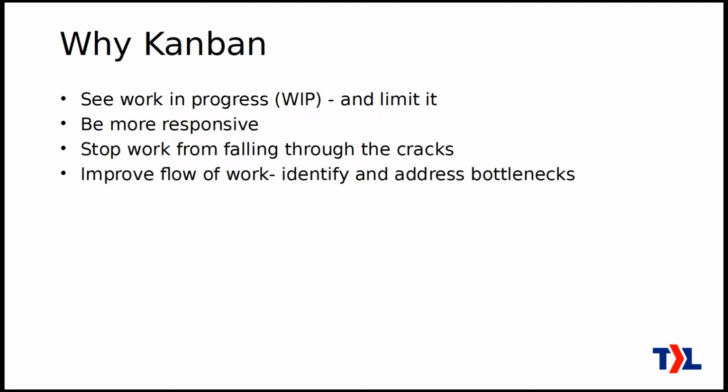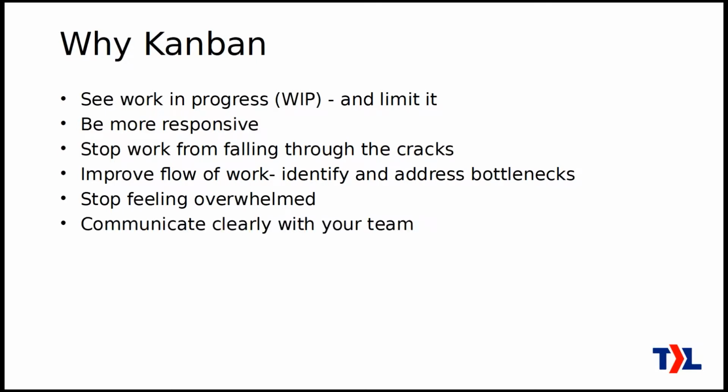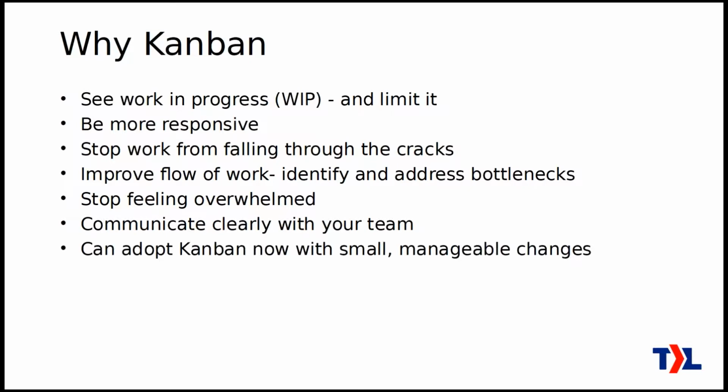It can improve your flow of work by identifying and addressing certain bottlenecks you might have in your team. The most common bottleneck is that one or two people in your team get consulted on a large amount of that work, and so they become the bottlenecks for your team. You can stop feeling overwhelmed when you can lay out what you're doing in a visual way. It's much easier to communicate clearly with your team because everybody looks at the exact same representation of the data.